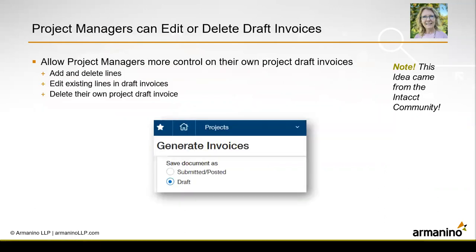Another project one that's really nice is the ability to have project manager users. Okay, so remember we have employee users, project manager users, and business users. If you have project managers doing invoicing for projects, they can now draft invoices, they can add and delete lines, they can edit the existing lines in a draft, and they can actually delete their own draft invoice. So it allows them to draft it, see it, make sure it's right before it posts.